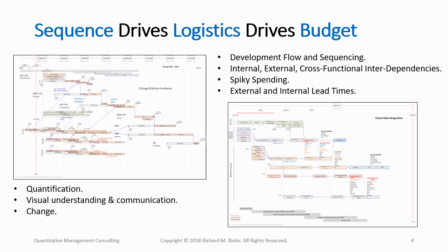In short, the schedule usually requires a few iterations to work out a plan that fits the required completion date. Both figures, hardware at left, software at right, are connected to the MS Project plan and update automatically. Have you seen figures like this? Hopefully these give you some quick intuitive grasp of the progression of the project. There's a training module on how to create these. You can make them at any level of detail, high or low level view. And note that each bears a quantitative scrutiny because they're connected to the material plan and the financial plan, all driven by the schedule.